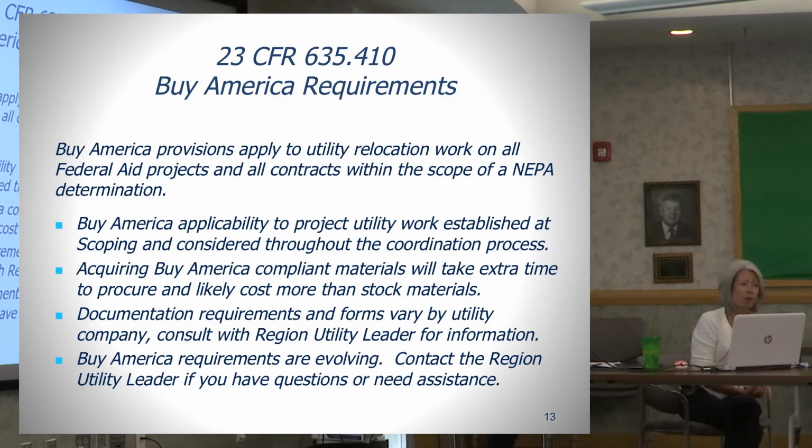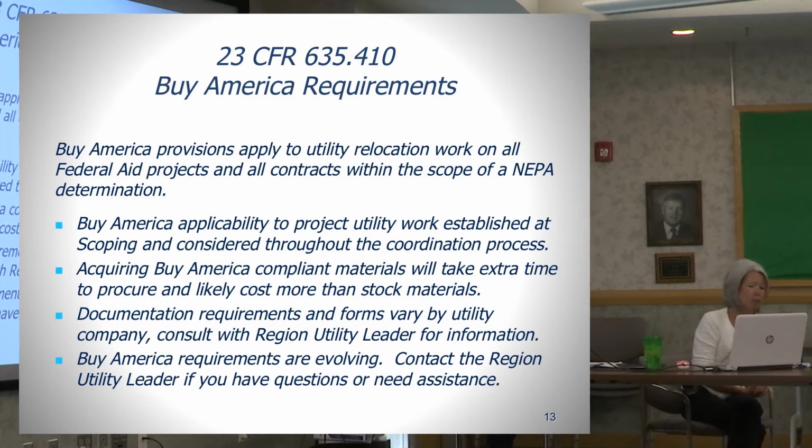The documentation for Buy America compliance varies between utility companies. It isn't a single certification, a single format. You need to make sure you work with your region utility leaders to make sure of the appropriate expectation for each utility company as far as their compliance with Buy America. And the Buy America requirements are evolving frequently, and the region utility coordinator is available if you have any questions or need assistance with Buy America requirements on projects during design or construction.